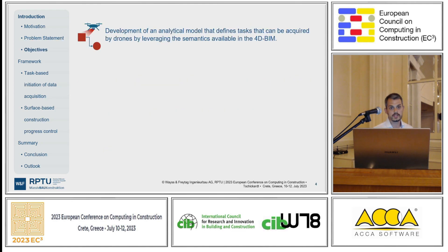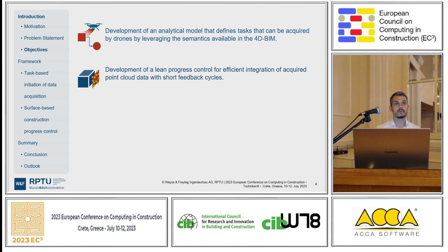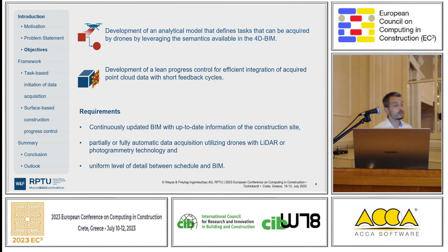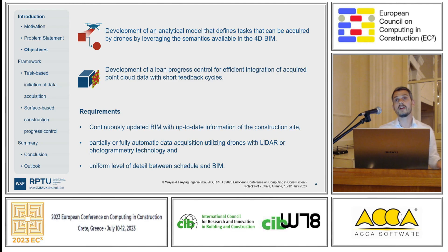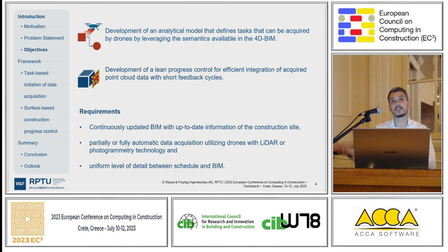The objectives of the research are to develop an analytical model that defines tasks that can be acquired by drones by leveraging all the information in the 4D BIM, and to develop a lean construction progress workflow for efficient integration of the acquired point cloud data — whether LIDAR or photogrammetry — for short feedback cycles. The requirements are that the 4D BIM needs to be continuously updated, with partially or fully automatic data acquisition using drones with LIDAR or photogrammetry. I focus on spatial data and require a uniform level of detail linking the schedule and the BIM, so each object is linked to its representative tasks and not the whole bridge to just two tasks.